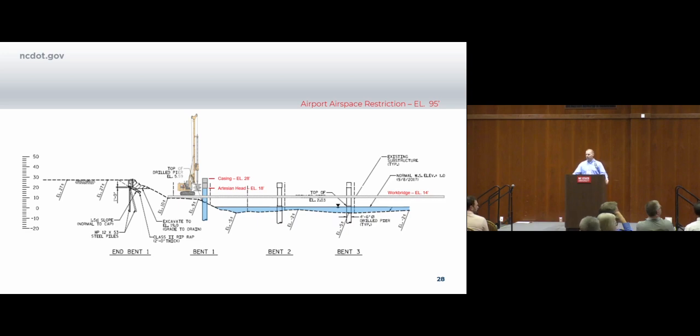So there's, again, 7 bents, three drill shafts at each bent. So we got 21 casings in the ground so that we could start drilling. They built their work bridge, and it's got fingers at every single bent, so fingers going off for each work bridge. So a lot of work and time and effort and cost went into the work bridge.